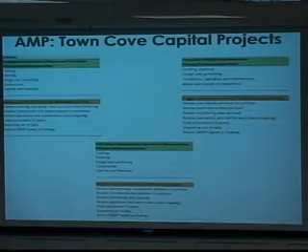Maybe we're going to add other elements to the implementation of solutions in the shorter term or the longer term. But at least for these 3, we've got some specific items, some specific activities that have to go on to implement them. And they are fairly consistently funding, planning, designing, permitting, constructing, and then operating and maintaining them, and in various permutations. But certainly, funding, planning, design, and permitting are going to take a few years.